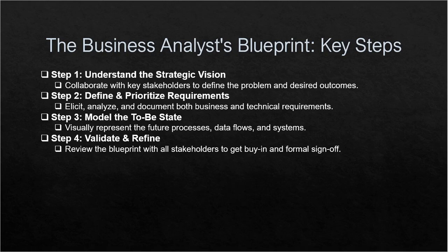And then define and prioritize the requirements. There are a number of requirements, so we need to sort and prioritize them on the basis of analysis, using the MoSCoW technique: must have, should have, could have, and will not have, and also the high importance and high urgency matrix. And we elicit, analyze and document both the technical and the business requirements, and then model the to-be state.